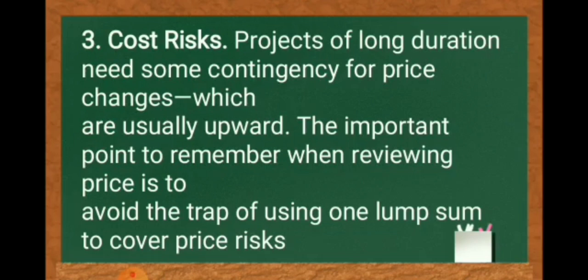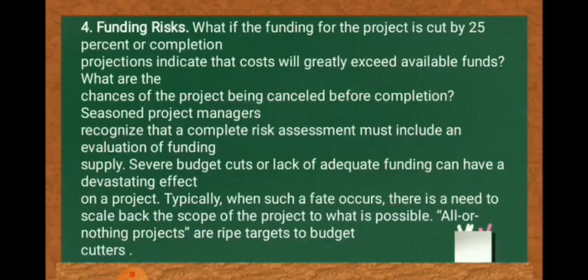Third, cost risk. Projects of long duration need some contingency for price changes, which are usually offered. The important point to remember when reviewing price is to avoid the trap of using one lump sum to cover price risk.